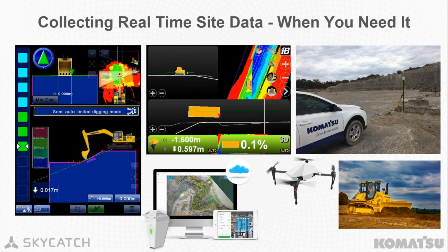So supervisors, project managers, foremen can see this data accurately on their site and visualize actually what's happening in their environment very quickly. The only thing is that IMC machines here in these scenarios are only collecting as-built data in very silo environments of their active working areas. So unless we have 100% market share on site where there's many IMC machines, we need other methods to collect whole site data, and that method is the Everyday Drone. So we fly the Everyday Drone to pick up as-built information from other parts of the site where other machines are working, people are working, where there's material movements. We can collect that data and then upload that straight to the SmartConstruction application as well.